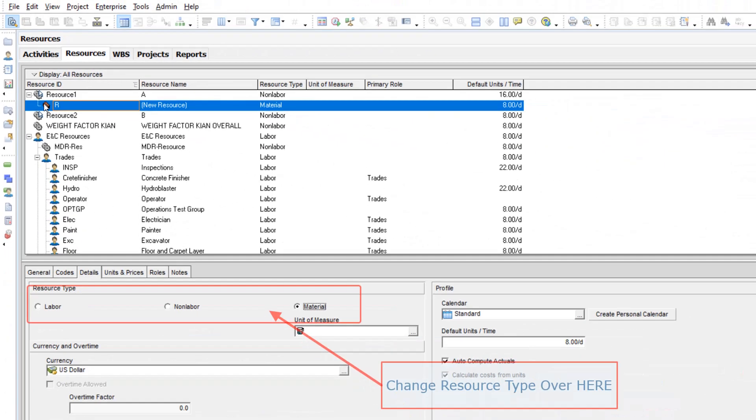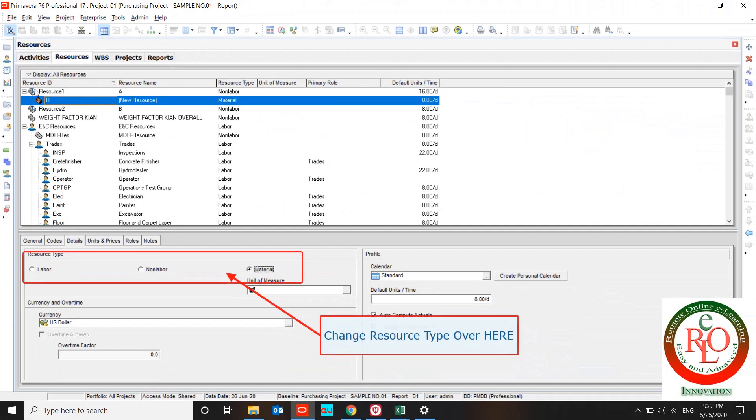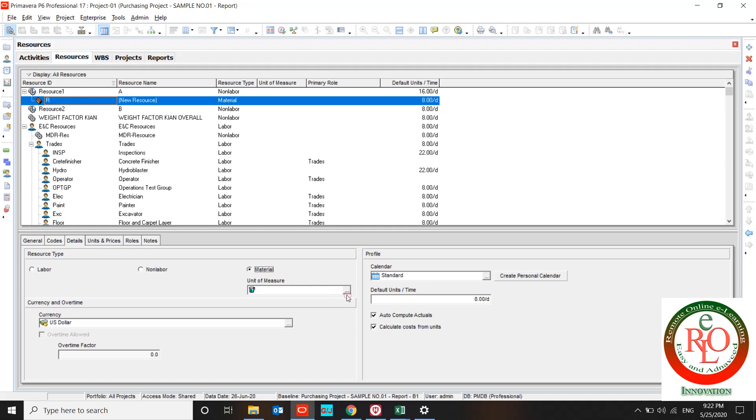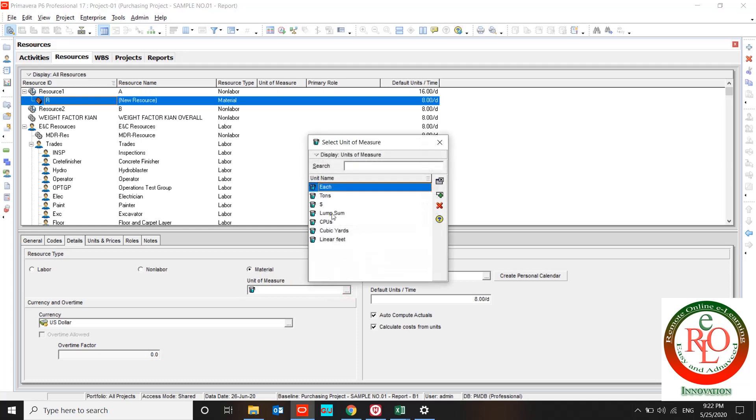So the sign of resource ID specifies your resource type. And if you use material you can use unit of measure for your material resource over here. If you need to define more units of measure, you can introduce it to the software by admin tab.